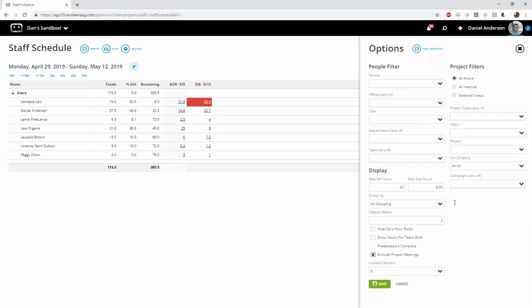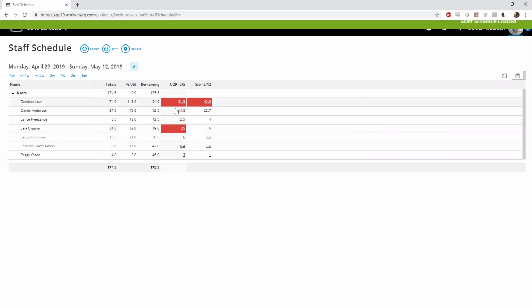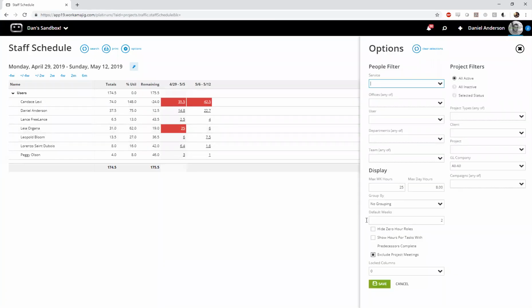That's up to you. But I did get some questions about adjusting the total number of hours that we use for these calculations, or kind of the maximum ceiling hours that you're looking for. And that's here in the maximum week or daily hours. So again, we have both a weekly and a daily view, and I could change this, for example, to 25 hours, and that will impact what you see here. First of all, anything that exceeds that amount, of course, is going to show up in red as just a visual indicator that something's over allocated what we're trying to shoot for a weekly allocation. And you can also do it at a daily level as well. So, again, not overly uncommon for agencies to say, I'm going to build some breathing room in here. We'll set it to 35, and then we'll set this to 7. How you manage that is up to you, but the defaults are for a 40-hour week and an 8-hour day.